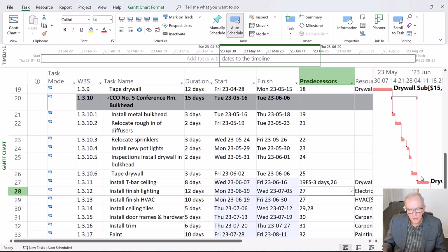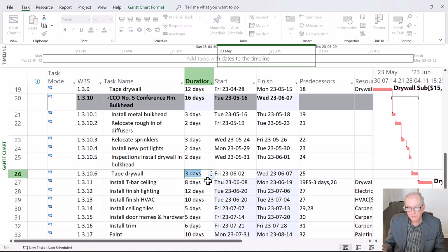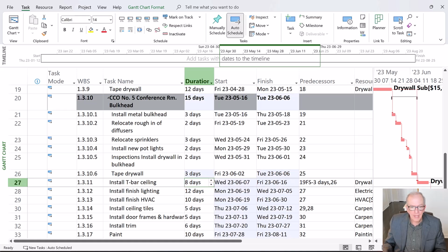I was curious. So you've got to ask yourself when you see something like that going on, what's going on? You've got to slow it down. Make sure, because I wasn't going to leave that activity without something connected to the end. I'm really adamant that you don't want to have open ends. You want to make sure that everything's connected so that if something takes longer later on, it's going to show that it took longer, right? All right, so now I've got that in.